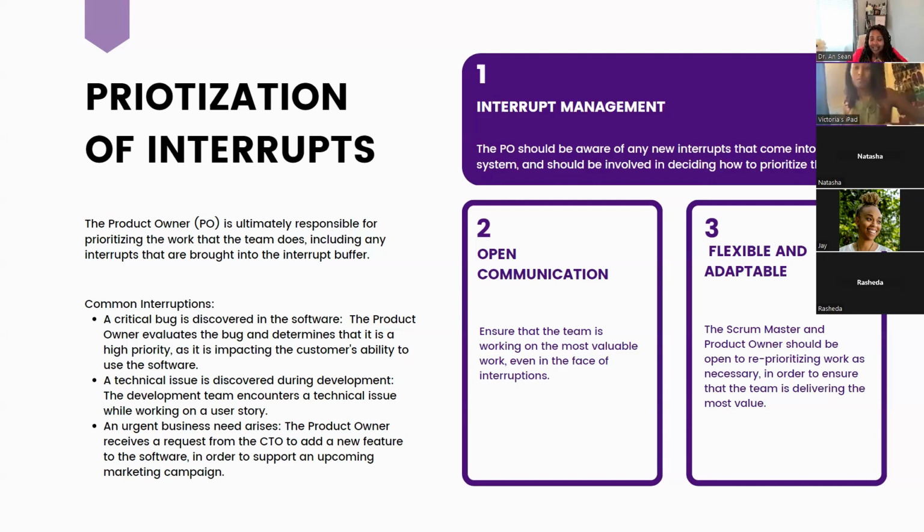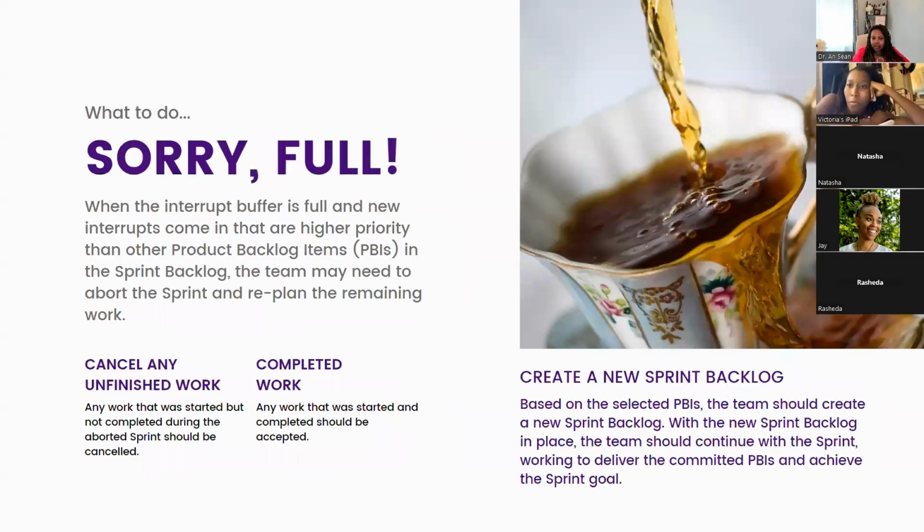And sometimes people think, oh, it's urgent. I've got to get into this sprint. And then when the product owner talks to them, you realize it really can wait. But that's where the product owner has to have those conversations so that we can make sure that we are only pulling in the highest valued user story into our interrupt buffer. So that's where the partnership comes in between us and the product owner.